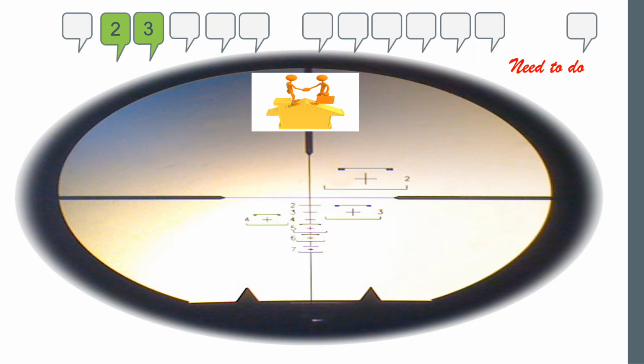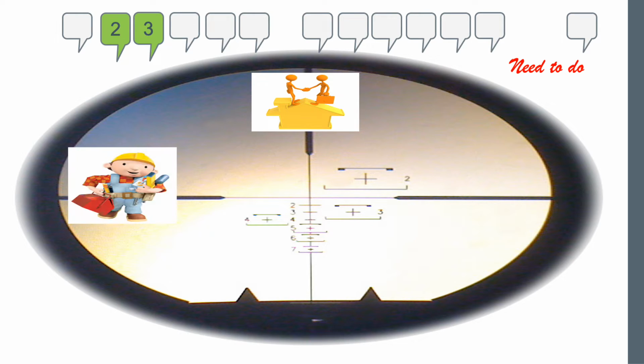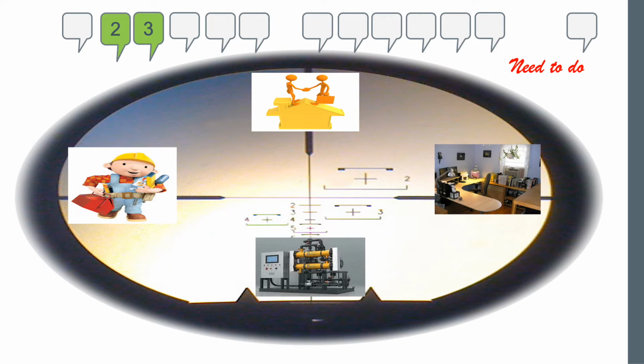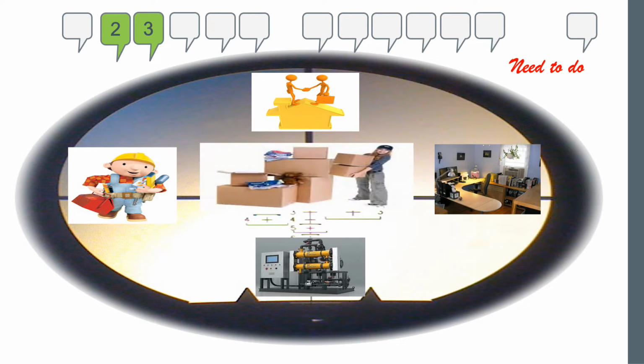And what do we need to do that? First of all, we have to get the tenant out of that building. Secondly, we have to renovate the building to accommodate the 16 people and the 3 pieces of equipment that are coming in there. Next, we must install the equipment and make sure the equipment is operational. And then we must modify the buildings so the staff have a place to work. And then finally, we must do the actual move.